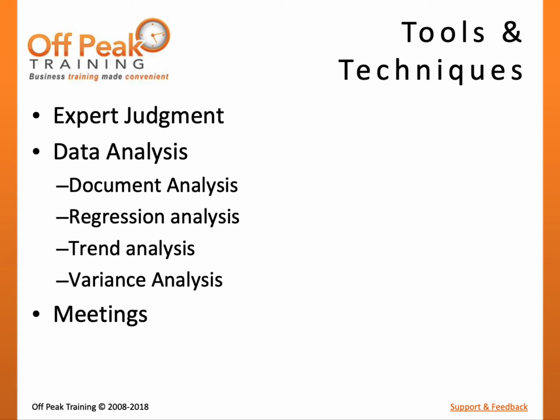While there are several tools and techniques described for the close project or phase process, the major theme is to perform the administrative steps required to formally close one phase of the project and move on to the next, or to formally close the project as a whole. This involves following the exit criteria described by the project management plan, capturing lessons learned, and assisting with any transitions that need to take place between two phases or between the end of a project and customer operations.